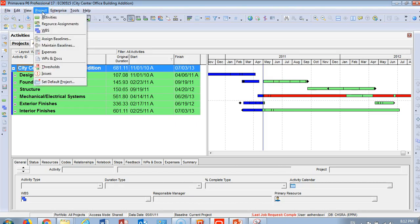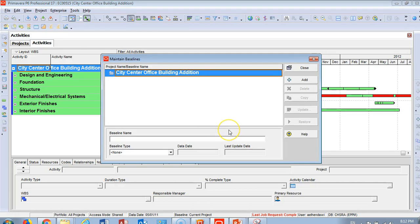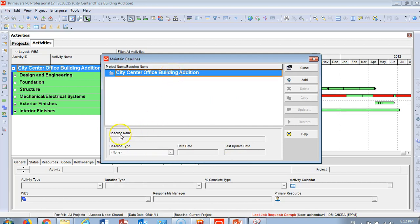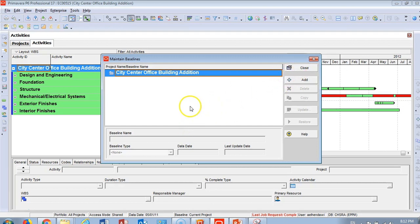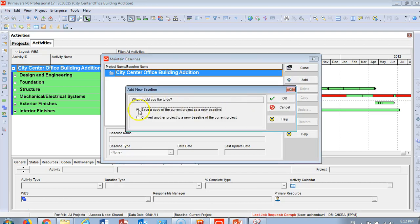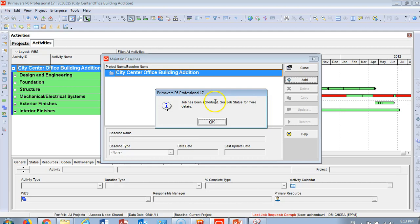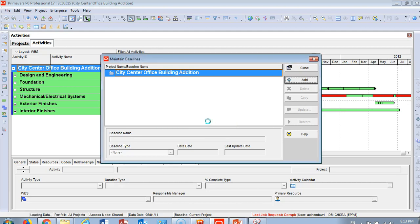How do you create a baseline for this schedule? Go to Project, then Maintain Baseline. You'll find the name of your project, City Office Building. Here's the baseline name, baseline type, data date, last update. What are we going to do? Click Add. The program will give you an option: would you like to copy the current project as a new baseline? Yes, and OK.